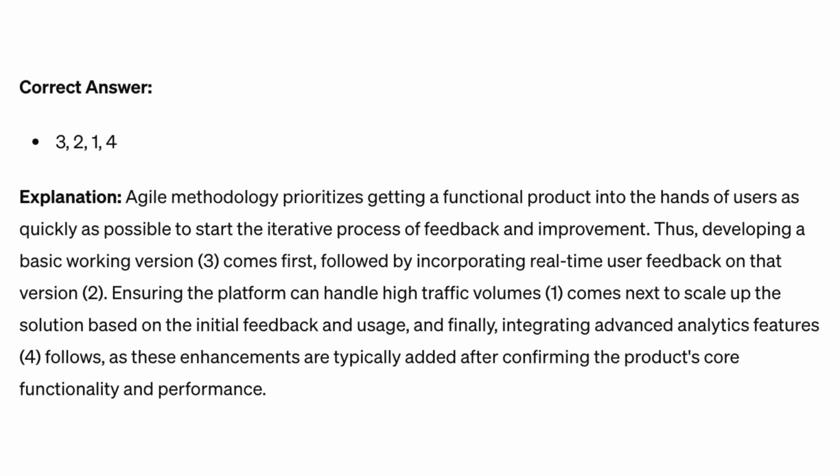Thus, developing a basic working version (3) comes first, followed by incorporating real-time user feedback on that version (2). Ensuring the platform can handle high traffic volumes (1) comes next to scale up the solution based on the initial feedback and usage, and finally, integrating advanced analytics features (4) follows, as these enhancements are typically added after confirming the product's core functionality and performance.